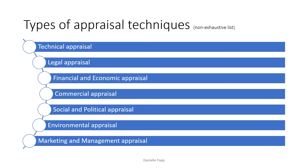There is a multitude of appraisal techniques available — for example, a project might be appraised from a technical perspective, an economic, commercial, political, or environmental perspective. To give an example: if I were to have a construction project and legally appraise it, a legal appraisal would be conducted to determine whether the project satisfies the legal issues related to, for example, land acquisition, title deed, or environmental clearance.